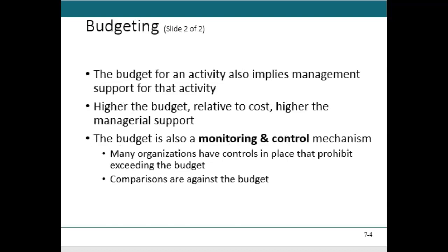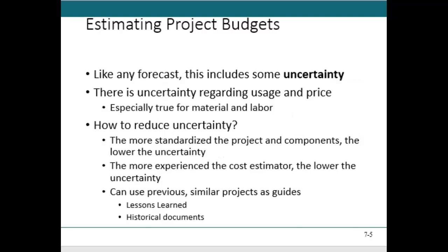There are tools we're going to use along the way. Earned value management is one of the best possible controls you can put on budget activities. We'll discuss EVM today a bit. Sometimes earned value management is the overall design. Earned value analysis — they're almost used synonymously, and it's okay in this course if you do. Earned value management is the overarching management approach, and earned value analysis is doing the actual math of it. It's about that budgeting and control — that monitoring and controlling mechanism.